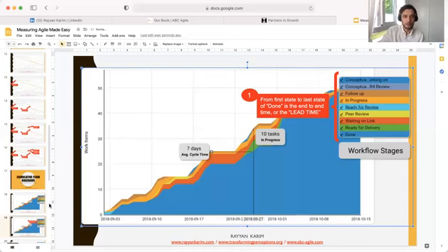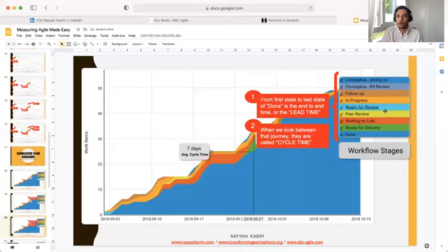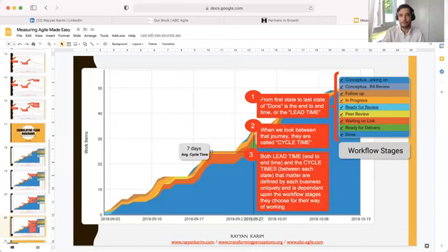The second point to really note is when you look between certain states, so let's say between ready for review and it being done. You might decide that that's a cycle that you have particular interest in. When you want to measure that cycle, it's called a cycle time. What I would suggest you do is have a really good think about the cycles that matter and the end-to-end lead time that you want to capture. That is the objective information that the team should be looking at regularly to reflect on their performance. And again, any information that they can surface about the rest of the organization and how that could change to improve their performance even better.